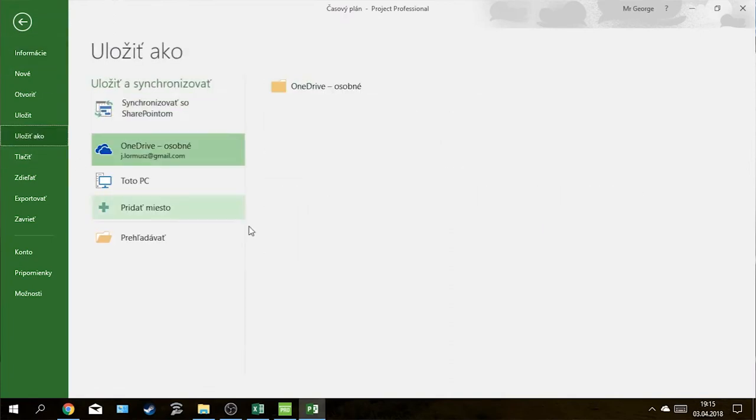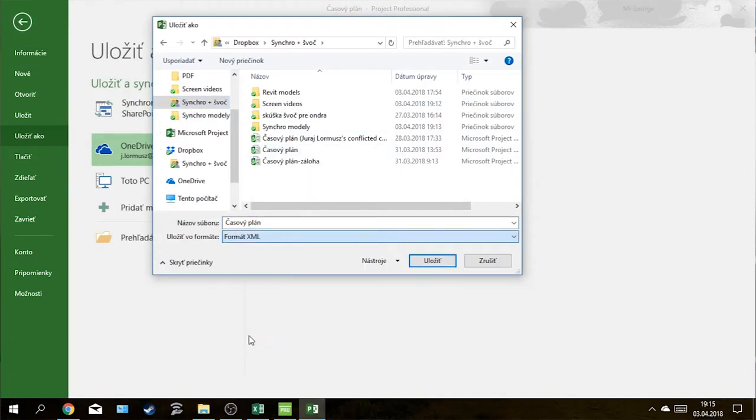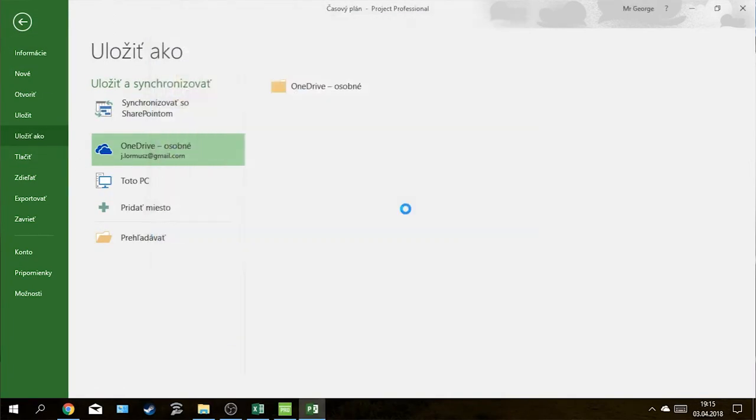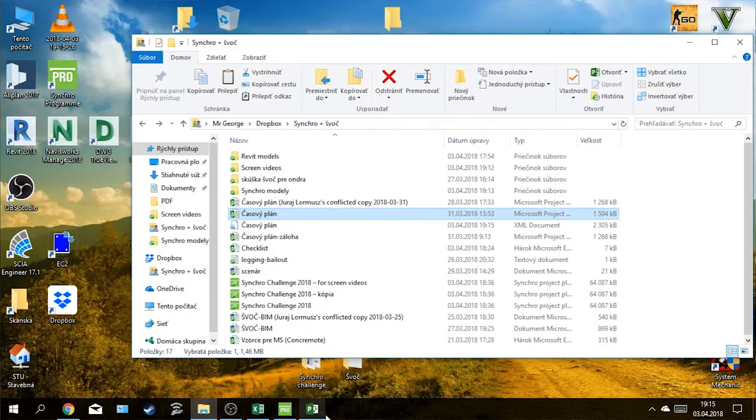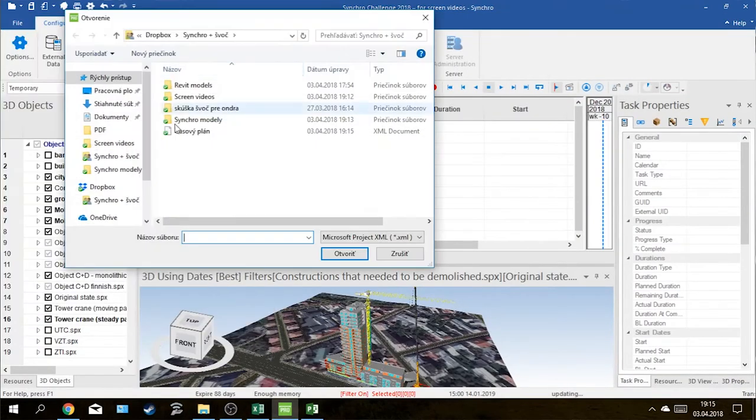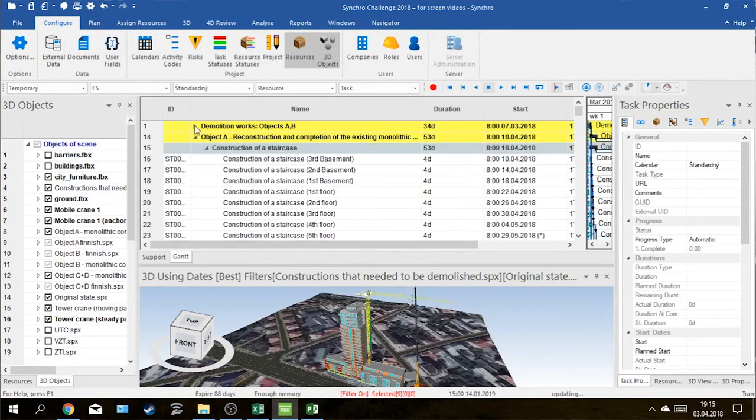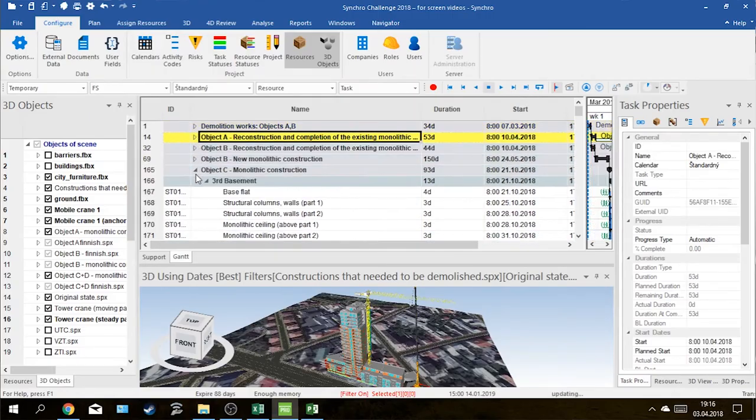The time schedule itself was created in the MS Project program and exported in XML format, which was imported in Synchro without problems. Synchro also enabled us to update or synchronize all of the imported items.